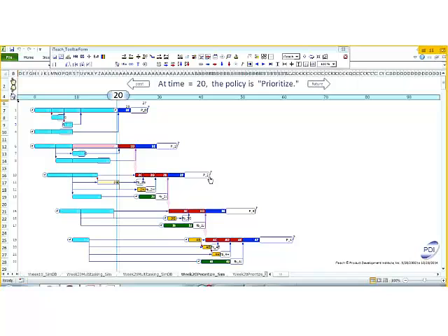What about the yellow and the green? Oh, so the yellow and the green, they don't have any work to do until about week 23. So what do we do with them? Well, we've frozen these later projects, and the critical change strategy and tactics tree talks about using the resources freed up from the frozen projects to do preparations on the ongoing projects.